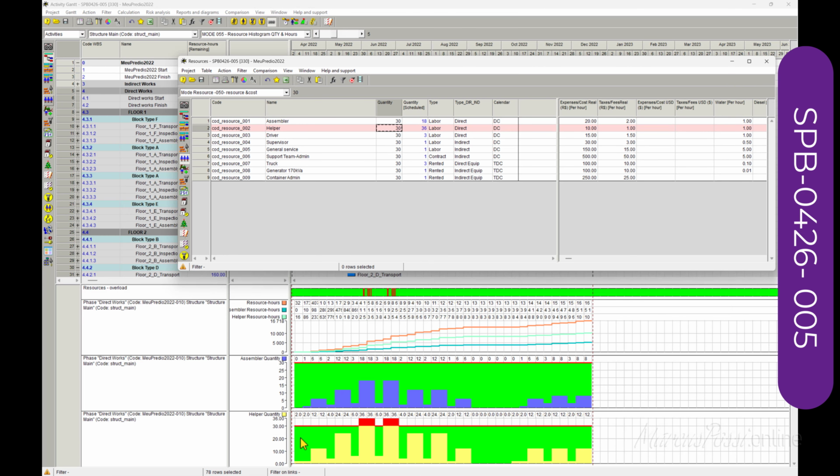Please note that the green area is availability. Yellow area means using. And the red one means we do not have enough people to work. Later we will see how to work with this. But anyway, it was red because you colored the line.